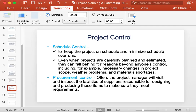Another project control area is procurement control. This is done when some of the facilities, parts, or products are designed and produced by other entities. In this case, the project manager or team will be required to visit and inspect the facilities of suppliers responsible for designing and producing certain components or parts of the facility being worked on, to make sure they meet the requirements.